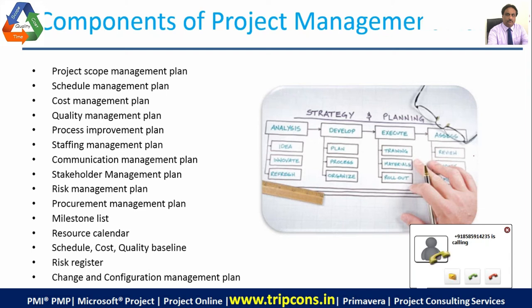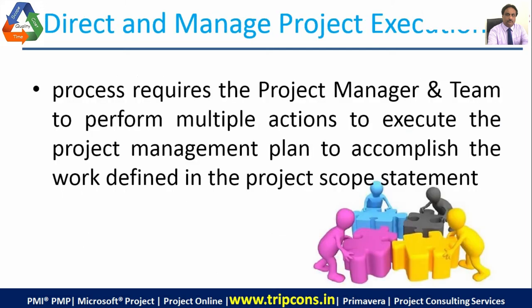The risk here is that the project work will go wrong. So you would first cross-check whether these changes are valid, required, and authorized. If yes, only then make these changes. That's what the configuration management plan is all about. You make sure that any changes happen according to a set pattern. It is authorized, clean, risk-free, acceptable to all, and will help in achieving the project goal and objective, not distract. That's why we put this configuration management plan, because this document is the sole crucial single point of truth, and any change to it can lead to absolutely right things or absolutely wrong things. So what we do next is direct and manage project execution.